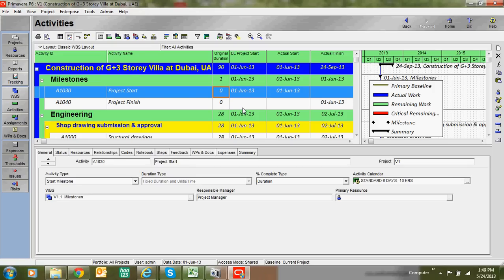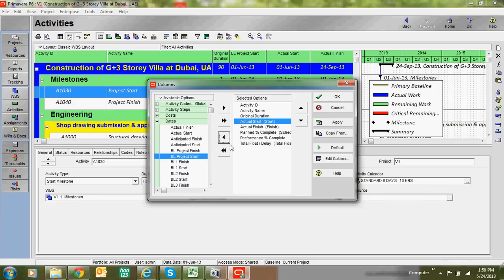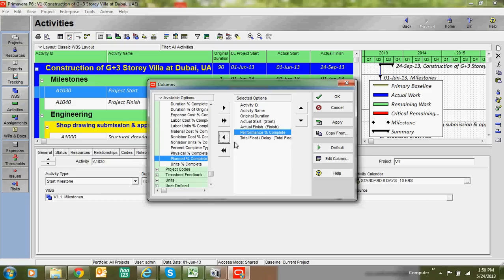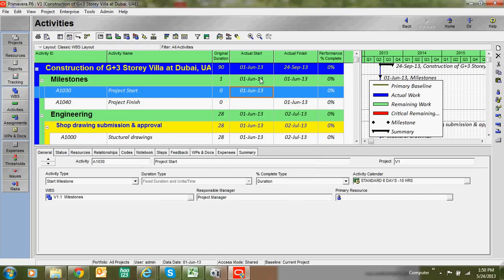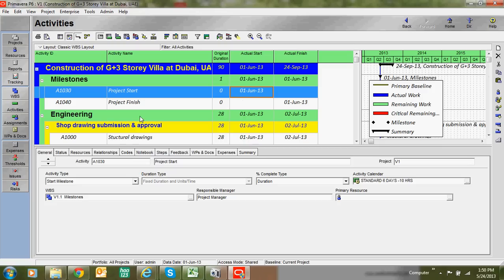Milestone activities have no duration and you cannot monitor progress on them — they are for viewing purposes only, though you can give predecessors as relationships. Looking at the columns, you can see Activity ID, Activity Name, Original Duration, Start, Finish, and Performance. There is a start date, finish date, and percentage of completion column, though percentage of completion has not been assigned yet.